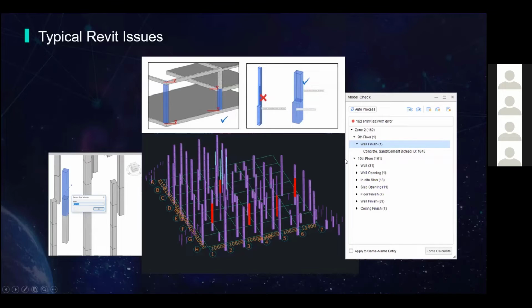And sometimes you have different wall finishes, for instance, and different errors, because inside Revit you have a lot of overlapping for the finishes, which does not cause any problem in Revit. But when you import into the cubic cost task software, it's going to tell you there's overlapping. So you have to pay attention to that as well.